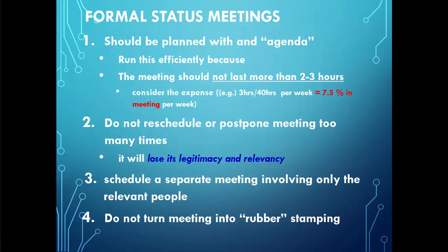If we calculate the 3 hours out of 40 hours, that's around 7.5% of the time of the employees, and if you multiply that by the money, this is how much you lose just by having them in one room for 3 hours. So you always would like to make it as short as possible and collect as much information as possible within the allotted time.